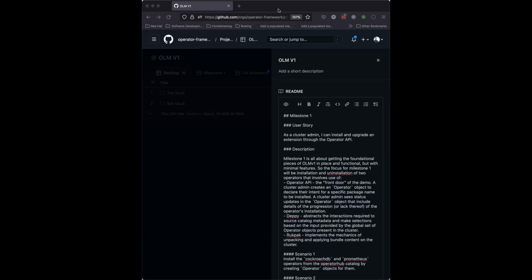And if something comes up that isn't something we want to do for one of the milestones, I'd probably say either just leave it in the backlog or put it in the GA milestone, depending on how critical we think it is to the final picture. But those sorts of things get out of date quickly and maybe aren't relevant after a couple of milestones are complete.